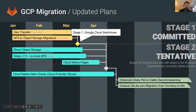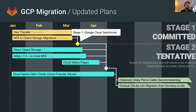This is an overview Gantt chart of the high-level project plan. I want to stress that the dates on the second stage are still very much tentative. I've included them to illustrate the dependencies between all the projects involved in this GCP migration, not the timeframes. Those dependencies are unlikely to change even if the timeframes do. This shows the gradual shift we'll have across to everything running in Kubernetes.